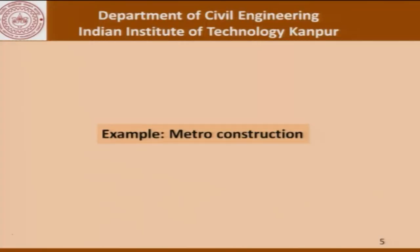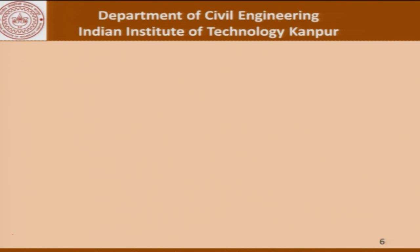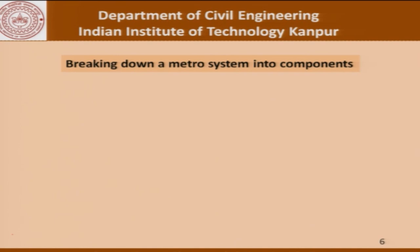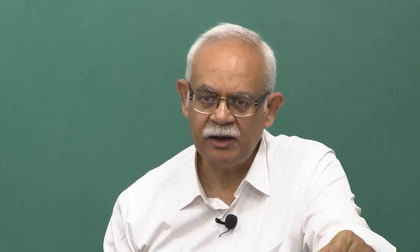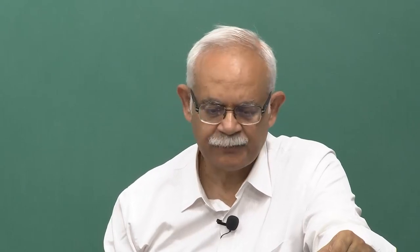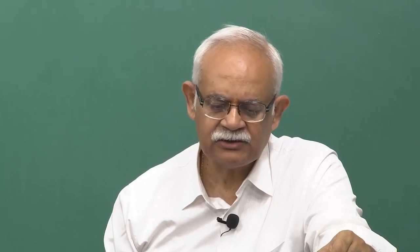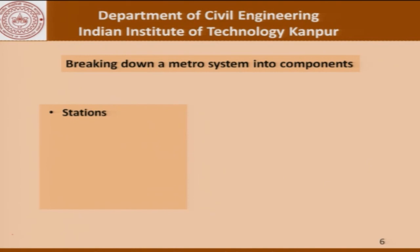Getting back to our example for today, which is metros — it would be easier if we break down a metro system into components and then try to see what kind of expertise would be required to implement a particular part of the construction. One way is to look at the different components in terms of stations, where metros or trains come and stay for a certain amount of time. The issues that go into planning a metro station include movement of passengers coming in and going out, and the movement of trains coming in and going out.